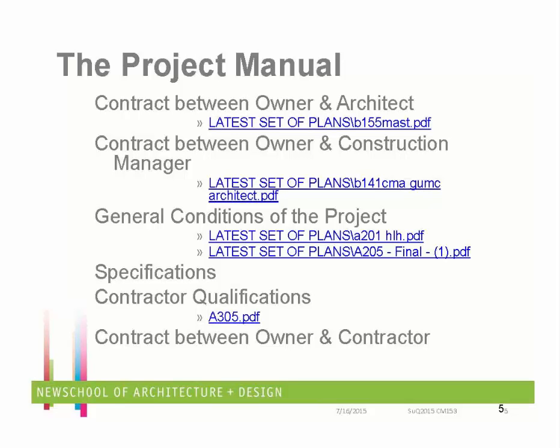It's about a 25-page document. It's called AIA 201, and it has been in existence pretty much since 1973 with, I think, 3 updates, and it pretty much is a consistent document. So we almost always say in our drawings that the general conditions of the project, AIA document 201, are included as if bound herein. Okay? That way everybody knows that's the basic thing.